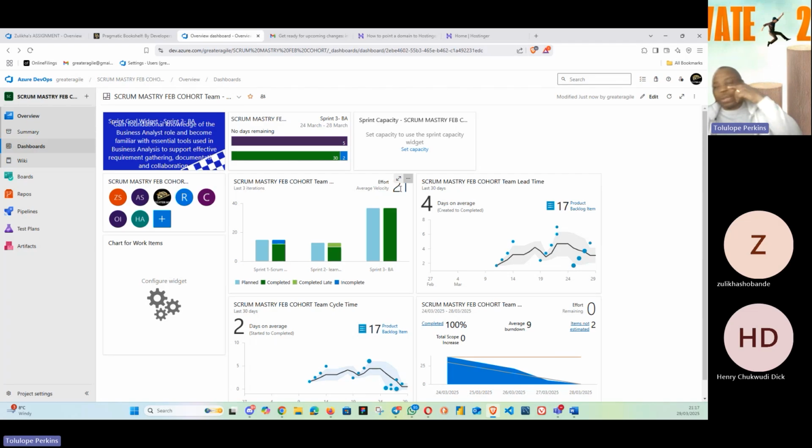So you need to keep your cadence, your time, constant. You can't have your first sprint being 1 week, second sprint being 2 weeks, third sprint being 4. That will not give you a true picture. It has to be 1 week, 1 week, 1 week, or 2 weeks, 2 weeks, 2 weeks, or 3 weeks, 3 weeks, 3 weeks.